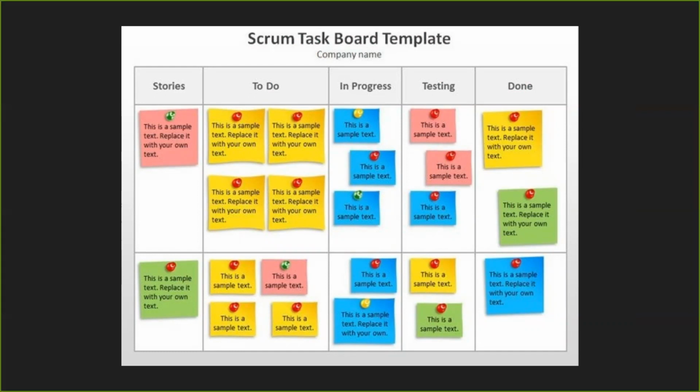So it's very important to understand what it means to actually be done, because in Scrum, at the end of your sprints, you want everything to be done. All the things you decided to do, you want them done, so that when you start on the next sprint, you're not hitting a whole bunch of bugs because you got rushed and tried to do too much, and then left bugs on the floor.